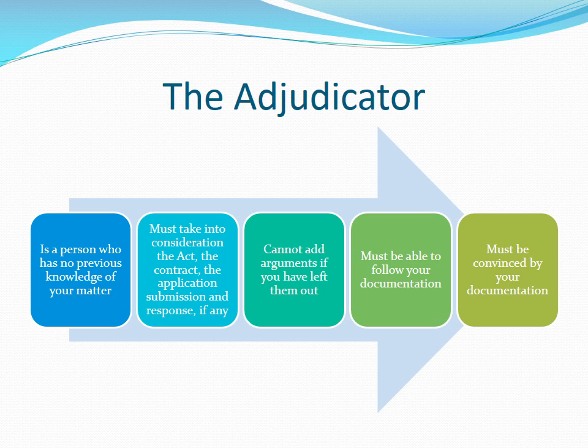As the adjudicator essentially only knows what the party tells the adjudicator, if you do not mention a point or matter, the adjudicator cannot infer it for you. Also, the adjudicator must be able to understand what you are arguing and why you are asking for whatever you are asking for. They must also be convinced by your argument, so keep it clear, concise, logical, and to the point, whilst ensuring statements are supported by evidence.